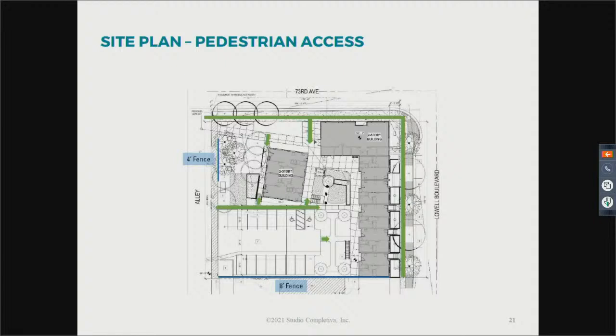As far as the undergrounding down south, with this development you have to pretty much rewire all those buildings, because they won't be able to take in the new wiring system when you underground it. So that's one of the hurdles we're having to deal with: how do you get the electric lines into the buildings that are south of here? That's something we're looking into.